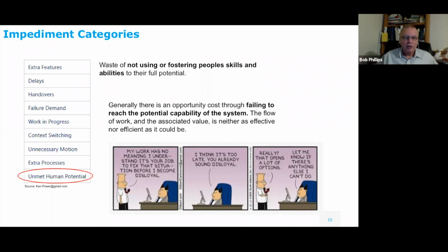And if anybody's interested, we can go into a more detailed discussion about this, because this is really important. In Scrum, you have what they call a reciprocal commitment. Basically what that means is once a sprint starts, no changes are allowed.